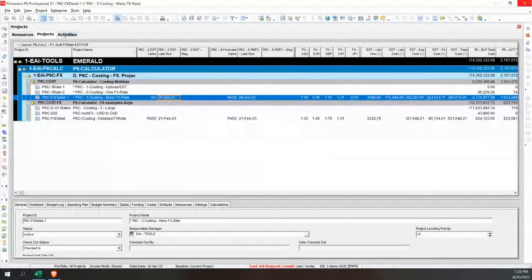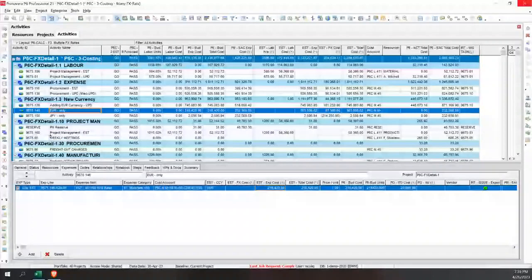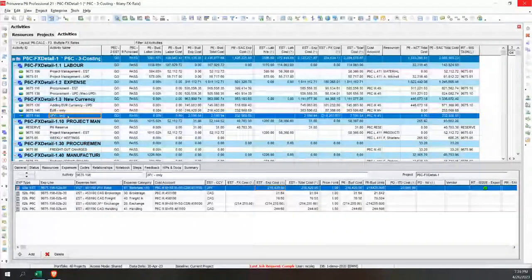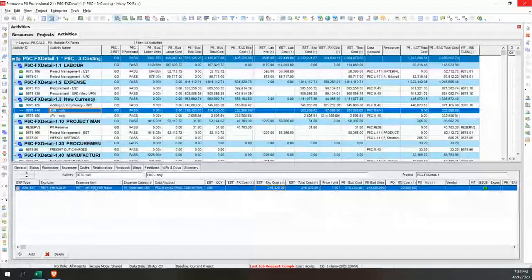Let's actually go look at them because I can't remember all of them. Okay, so brokerage, freight, exchange, handling. They wanted these to be automatically calculated because every time they purchased certain items, these always went along with it. That's quite a few things to have to calculate. So this line is going to get blown out into numerous lines once this estimate runs through and does its thing.